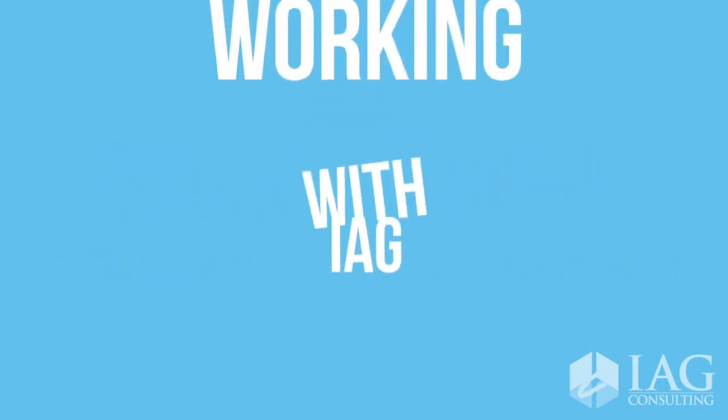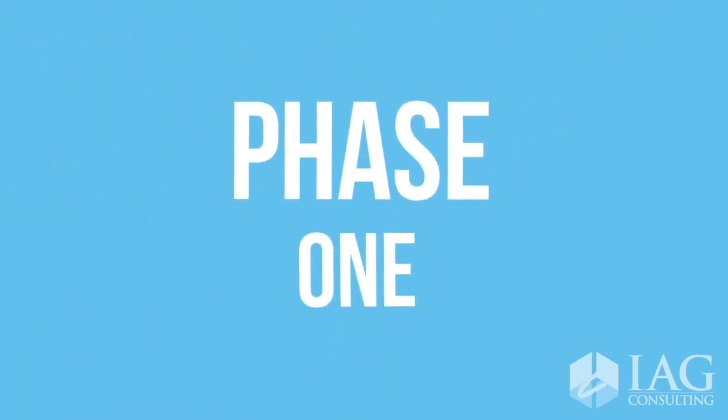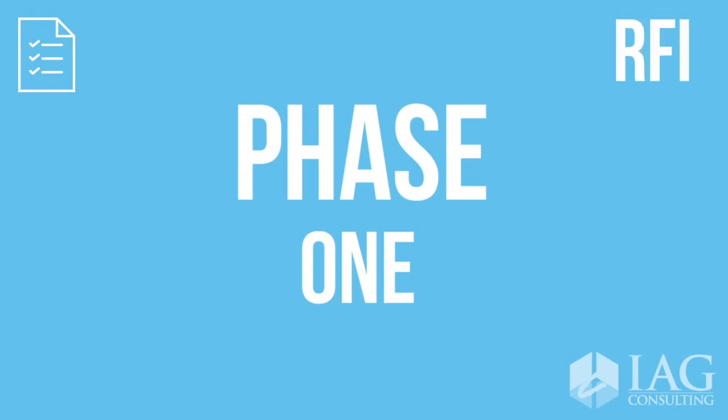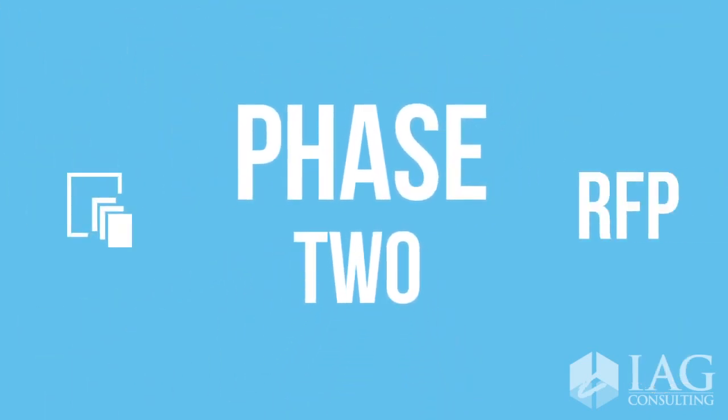Working with IAG, we came up with a two-step process to allow them to very quickly get to that RFP process. It was a total of 3 weeks on site to detail the requirements over 2 phases. Phase 1 was to do high-level requirements that would be used for an RFI that would allow them to identify a potential pool of vendors. Phase 2 is when we would do more detailed requirements that would be used to create an RFP. And remember, this is a 3-week process.